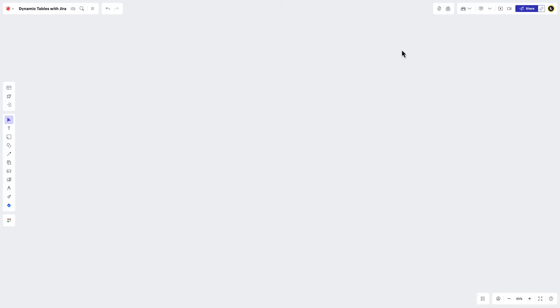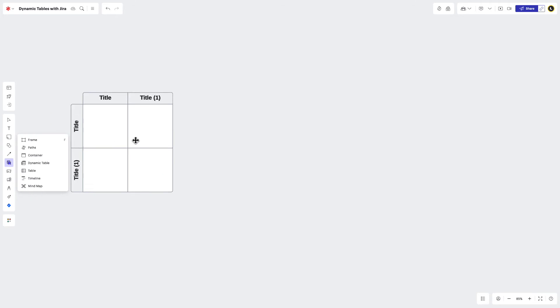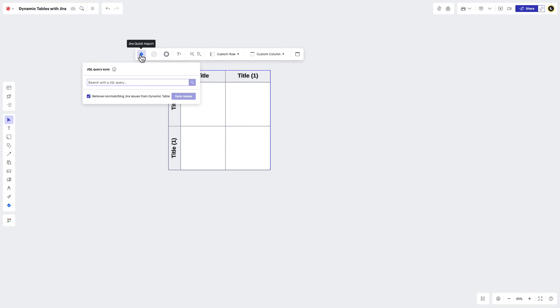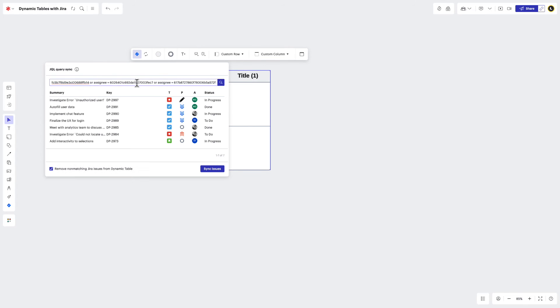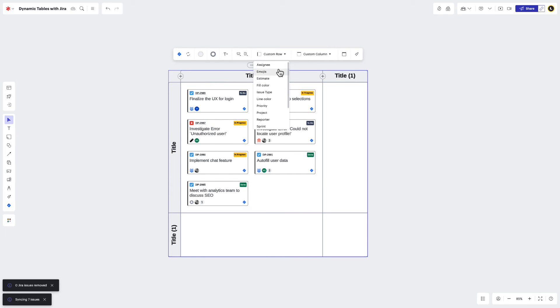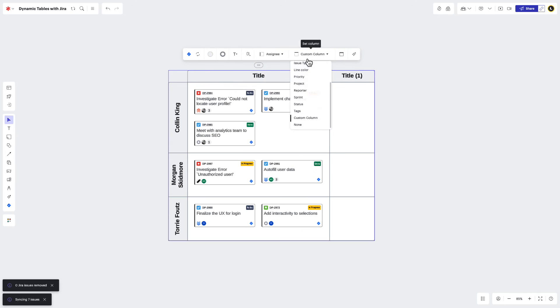You can also visualize a specific set of Jira issues with the quick Import feature. Navigate to the Organizers icon and place a dynamic table on the canvas. Then select your table and click the Jira icon from the toolbar that appears. Type in your JQL query, press Enter on the keyboard, and then click Sync Issues. This will place any matching issues in your dynamic table so you can arrange and edit them according to your needs.